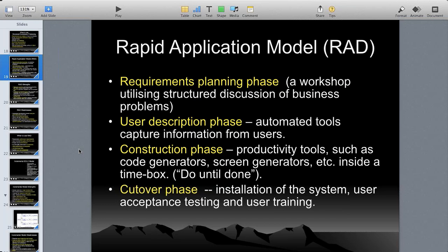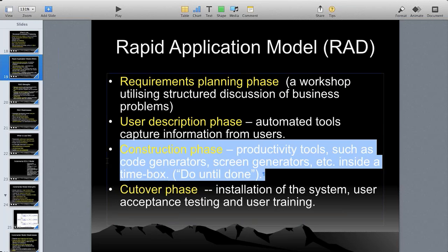So 10 days, requirement gathering is over. Let's say 5 days you take for documentation, over. 15 days is over. Immediately the designer will start the setup and start designing. Once he designs a small chunk, a small bit, immediately he sends it to the programmer. The programmer will write the code. Meanwhile, BA gathers all the requirements, designing and development happen at a time, and testing happens later, after development. Whatever it is, according to the flexibility and the project, we speed up, and that is what is bypass. We are merging the work. That is what happens in the construction phase.